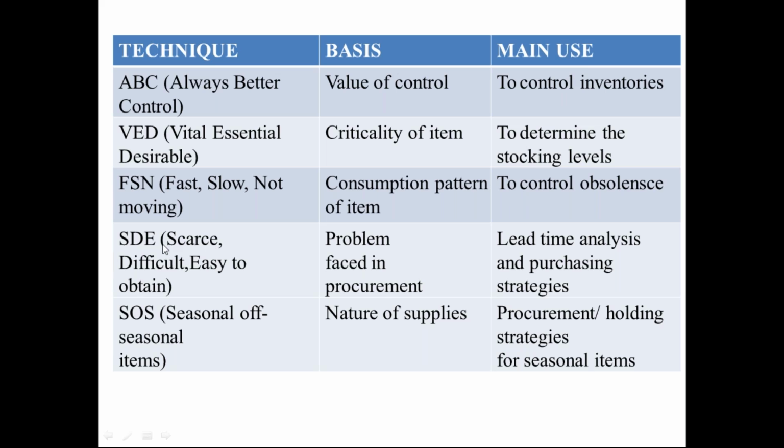The next technique is SDE, that is scarce, difficult, and easy to obtain. The basis for this is the problem faced in procurement, and the main use is the lead time analysis and purchasing strategies. The next technique is SOS, that is seasonal and off-seasonal items. The basis of this is the nature of supplies, and the main use of this is the procurement or holding strategies for seasonal items.